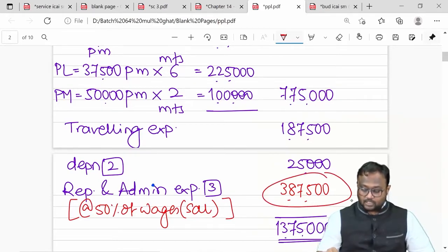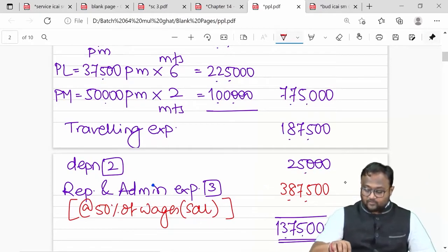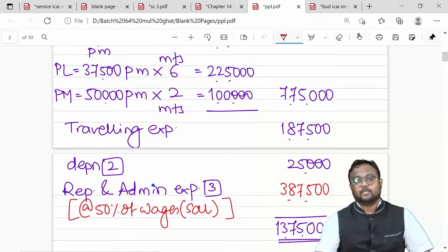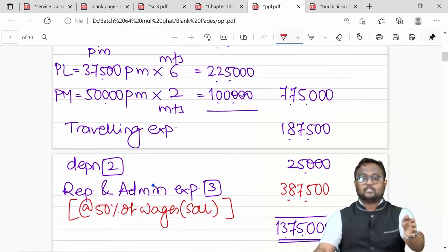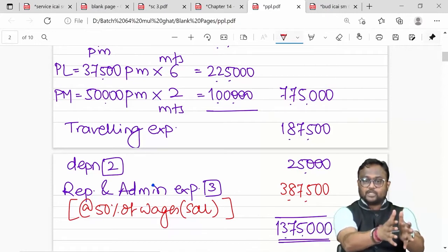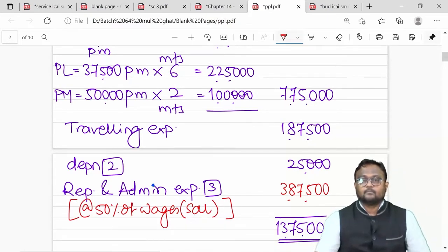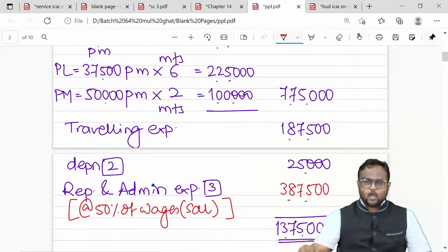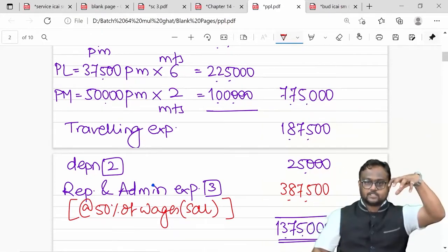50% of it will be charged as overheads. So wherever 30 lakhs goes, 15 lakhs will be there. So any part of 30 lakhs if you are transferring or charging to one particular project, overhead will be charged to the extent of 50%. Total labor 30, total overheads 15.